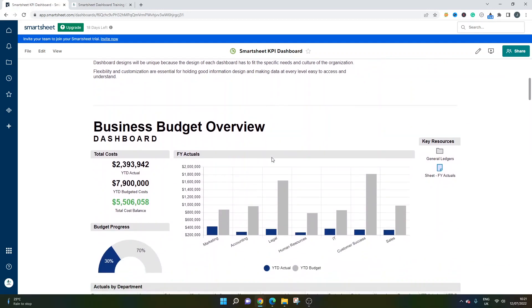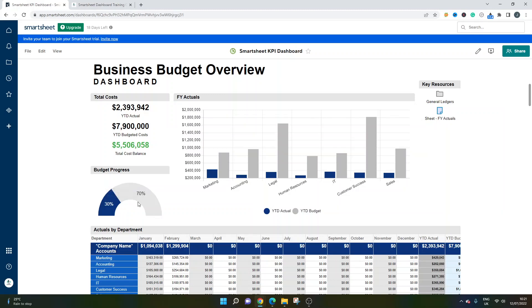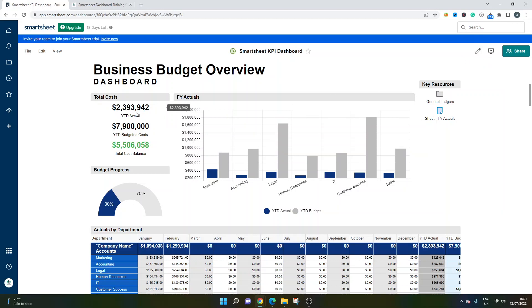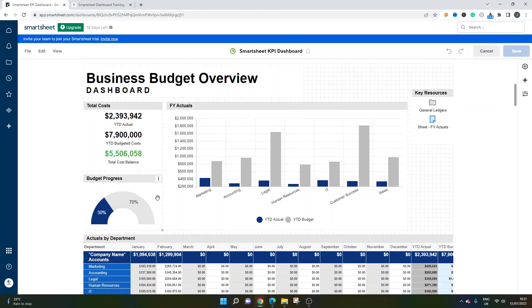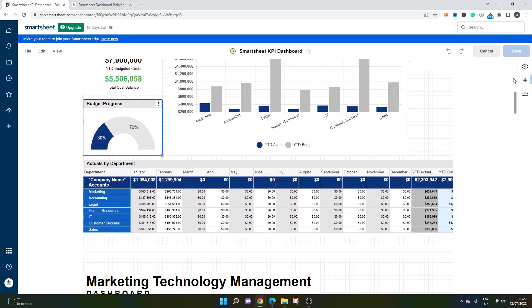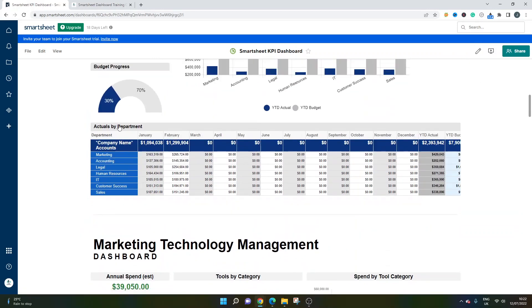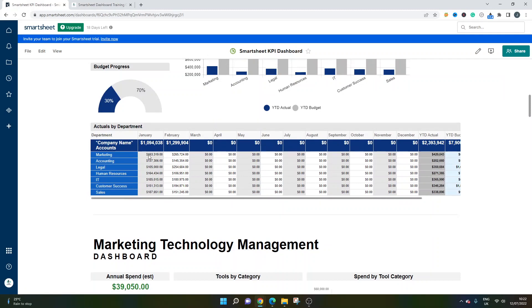The first one I've created here is a business budget overview. Here you can see quickly the total cost of a project against the budget and the cost balance as well. You can see what the balance remaining is against the year to date actual. And it's also broken down by department. These are metric widgets, and these are chart widgets. We've also got a report here which gives you the actuals by department and also by month. So you can check the monthly performance of each department. Very useful. You can see who's over budget, who's reaching their budget, etc.